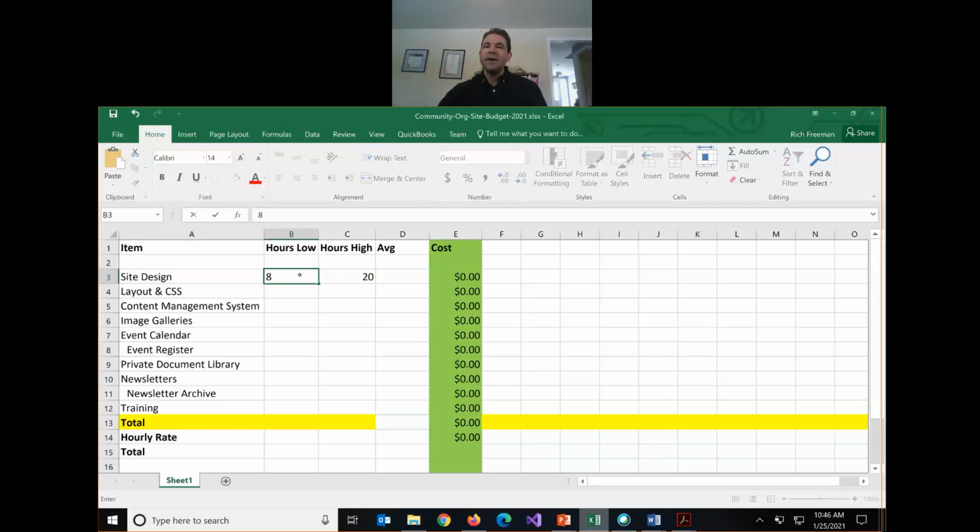So I find using this kind of Excel template, which I'll put on Blackboard and you can use, this is what I want each of you to do for the project budget. So go through Quinton's requirements, itemize it, what are all the components, and then do a low and a high for each, right?